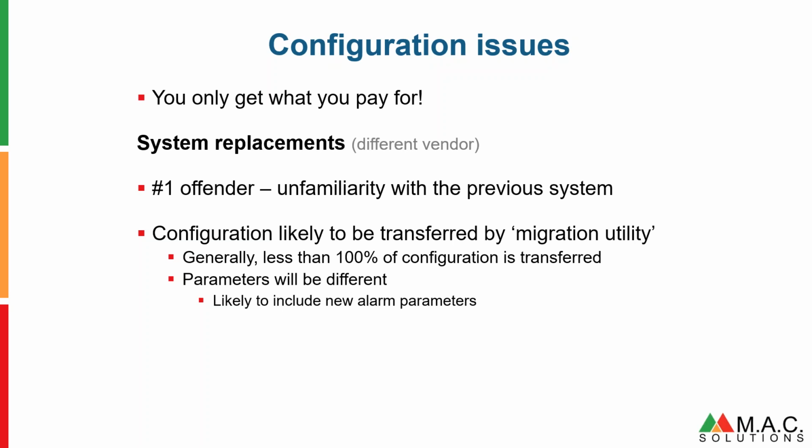They weren't familiar with the old system. They probably used a migration utility, which generally doesn't take 100% of your configuration, or if it does, it may not do it fully correctly. There will be new parameters in the new system, which migration may just set to default. We can do this in a day. Everything gets set to default if it's never been used before.